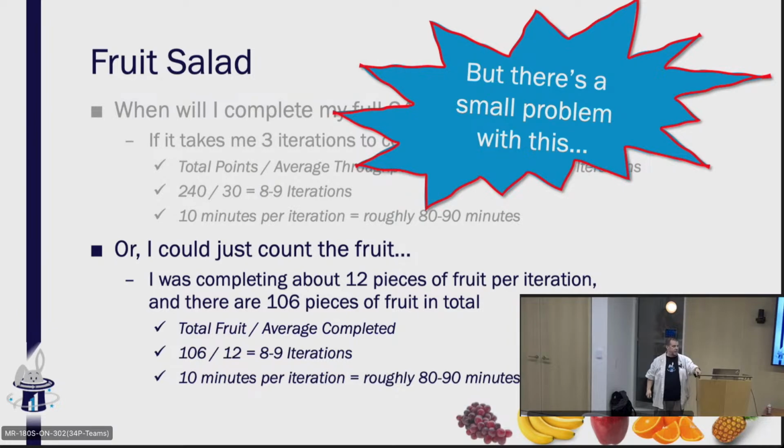If there's a dependency in the past, or if there's a specialist available who can only do work on the grapes, that may change something. We're going to pull the grape specialist off, and no one else can work on grapes. All right, well, that's a problem. Now we've had 3 iterations to get other people able to work on grapes. Why haven't we done that? So we may want to do that.